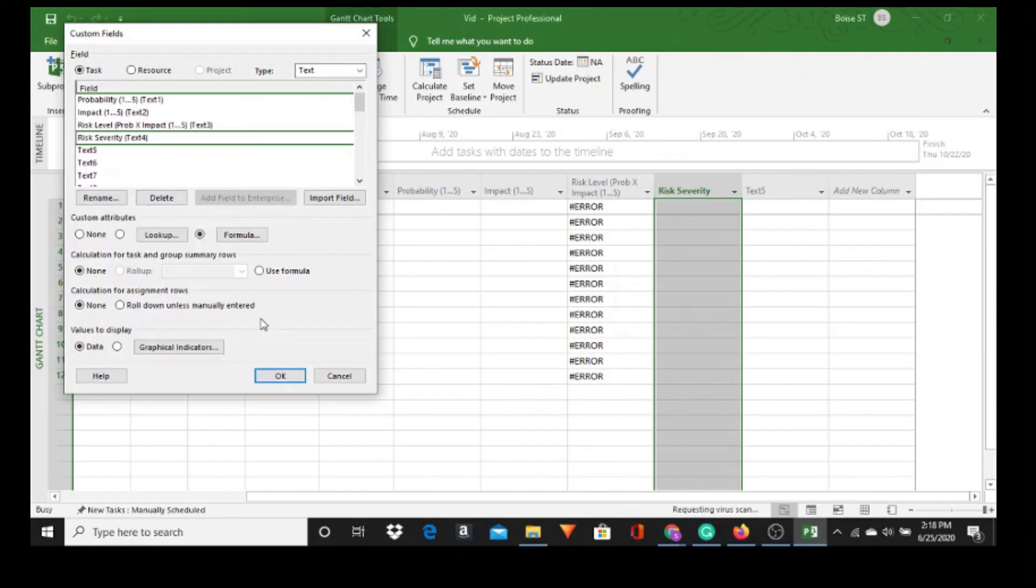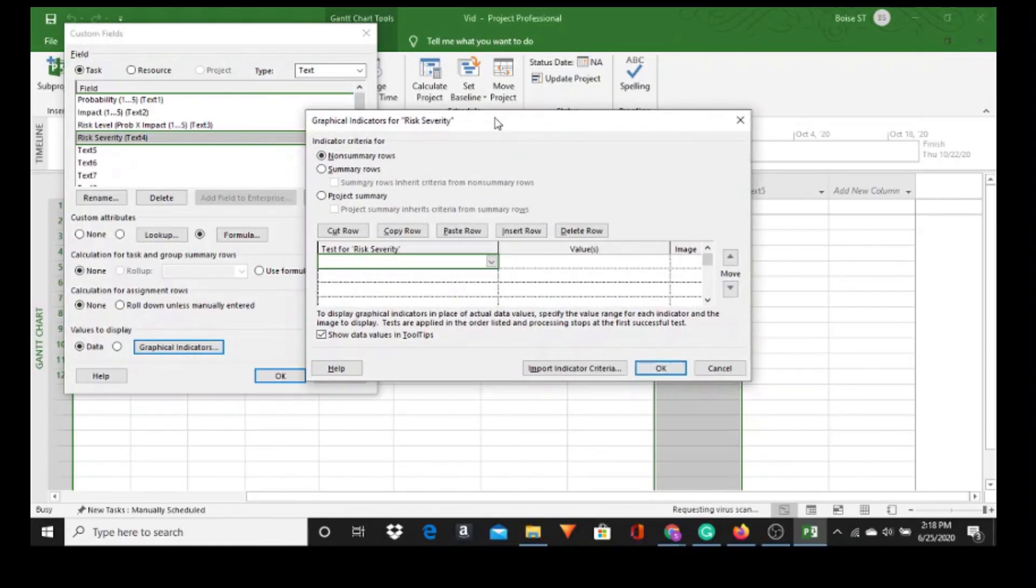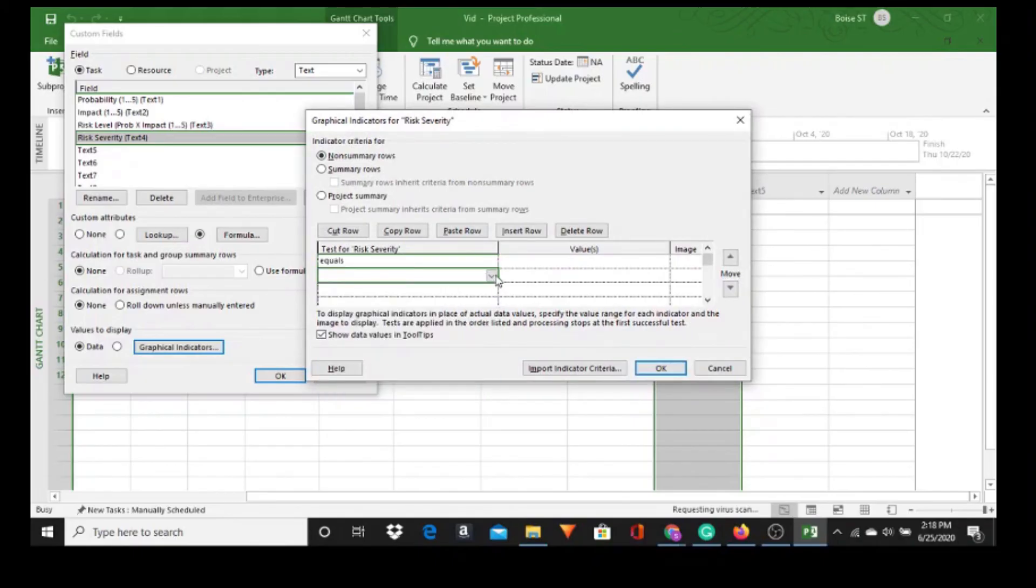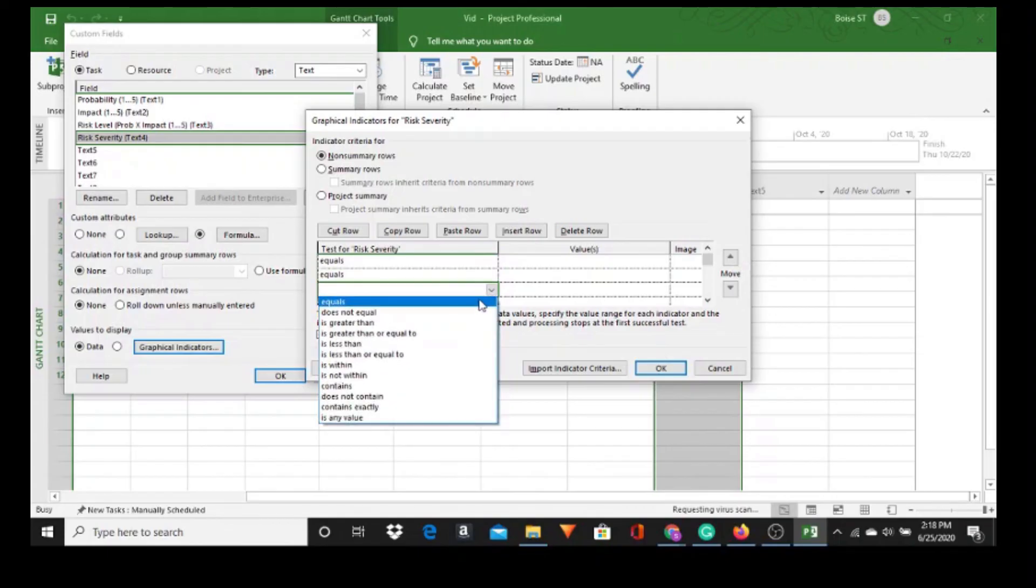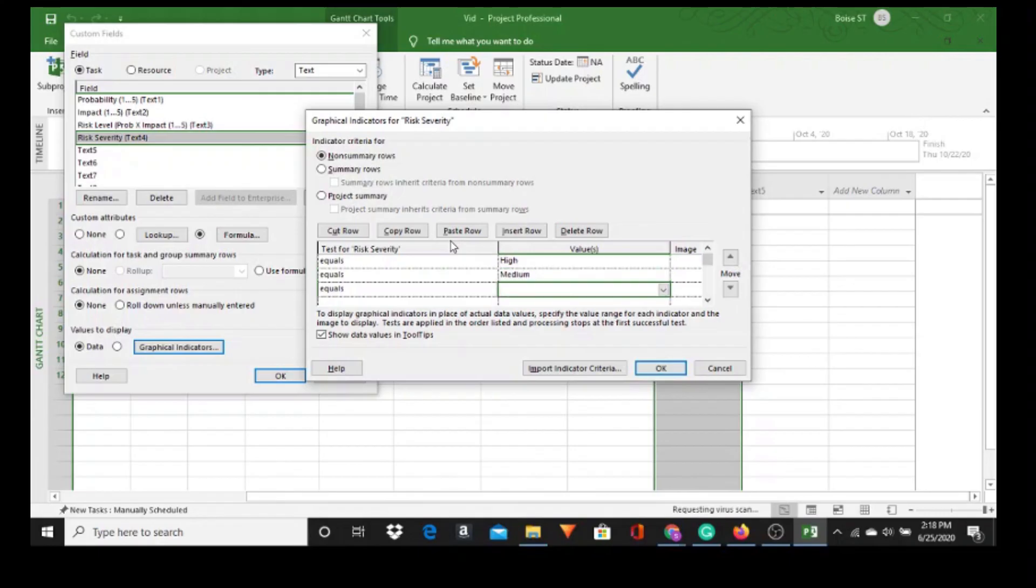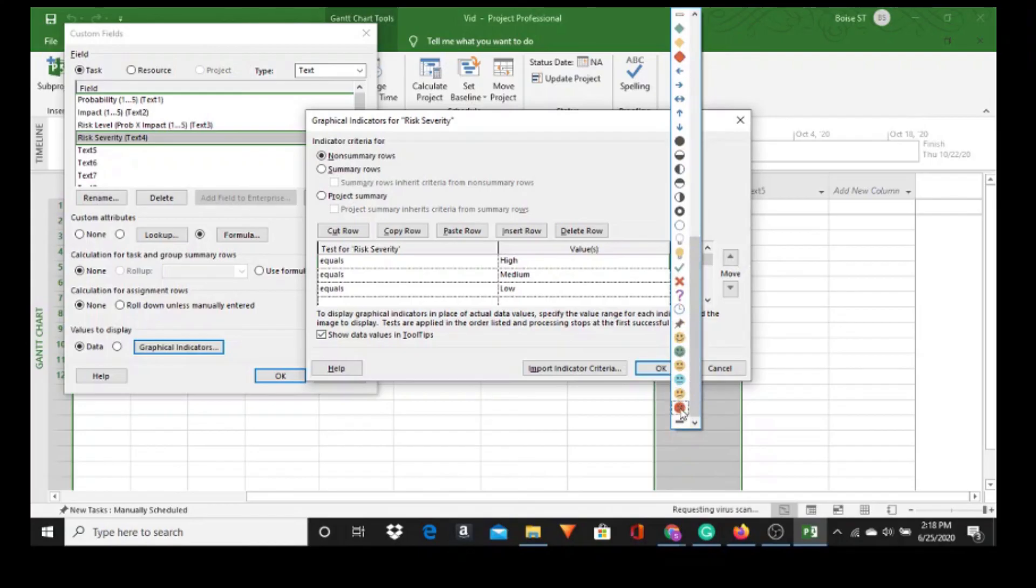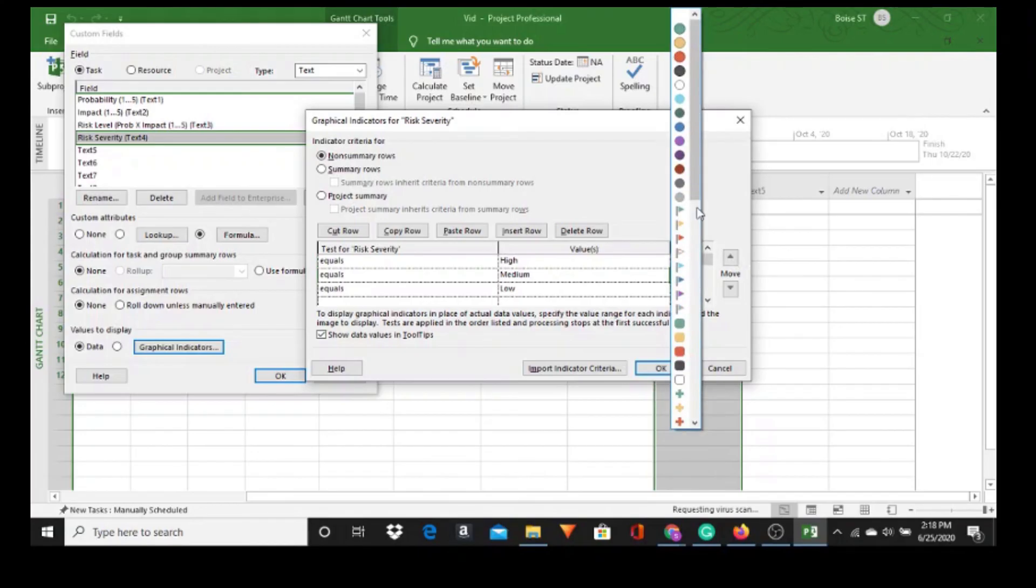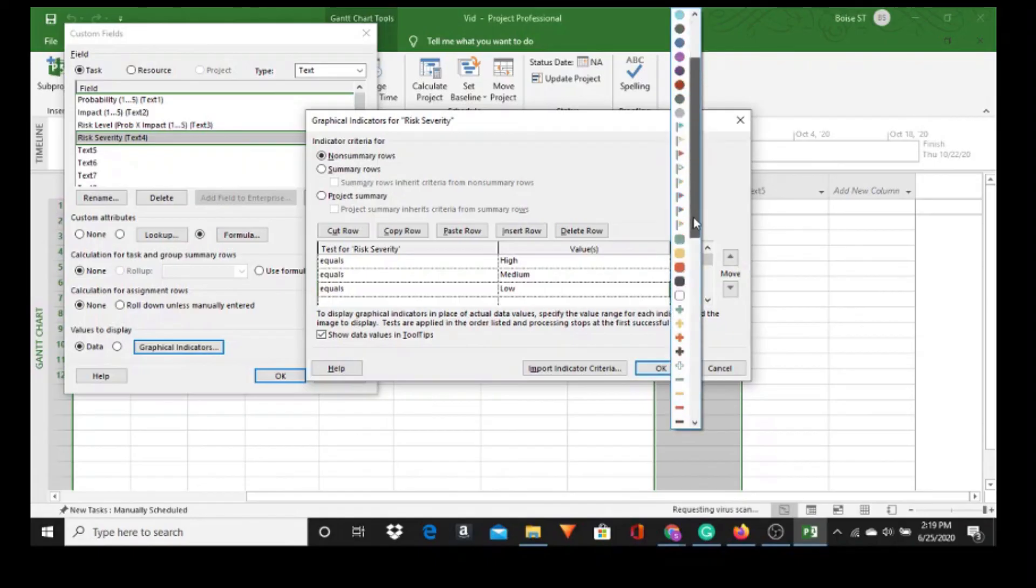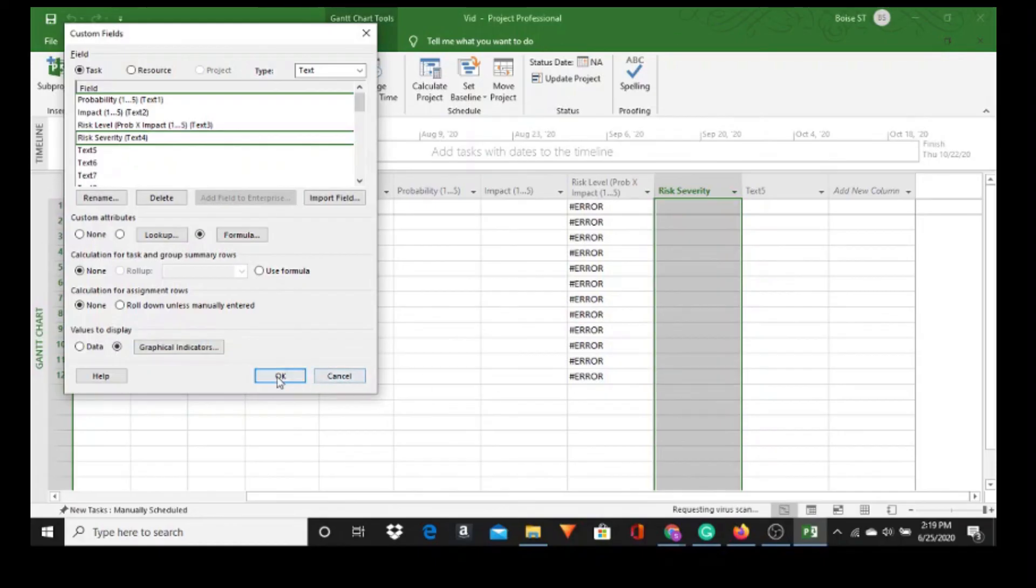Oh, before we do that, let's put some graphical indicators in here. It will come clear here in a second. Let's go Equals. We're going to have three graphical indicators. The values we're going to put High, Medium, and Low. Now here's the graphical image. For High we want a red frown face or whatever you want to call it. For Medium we want a neutral face and we'll go green. And for Low we want a happy face. Let's go back color so we've got three different colors and three different faces. And OK. And OK.